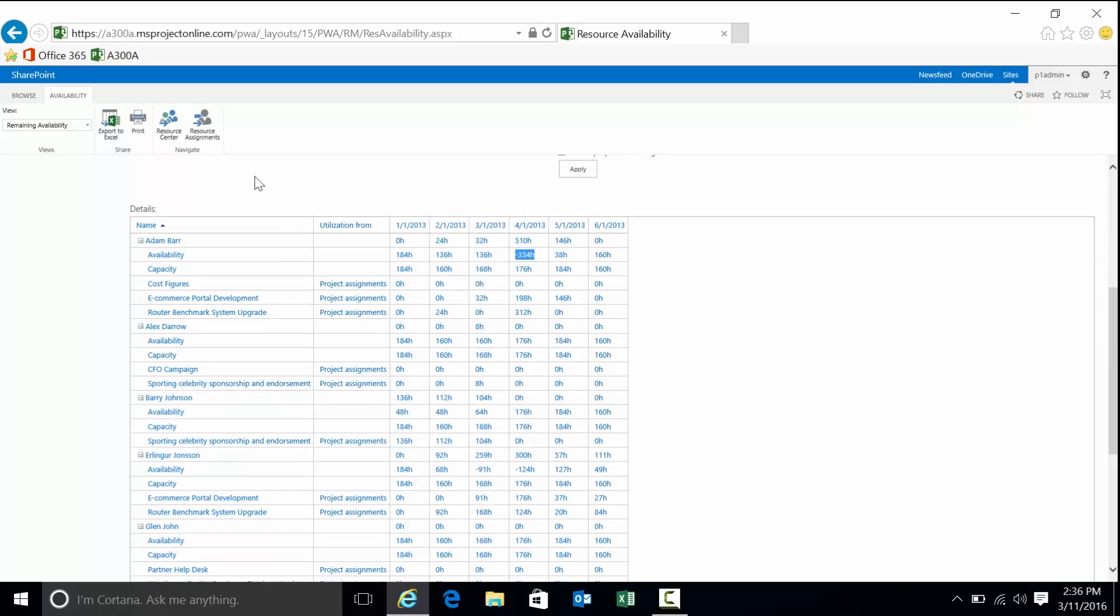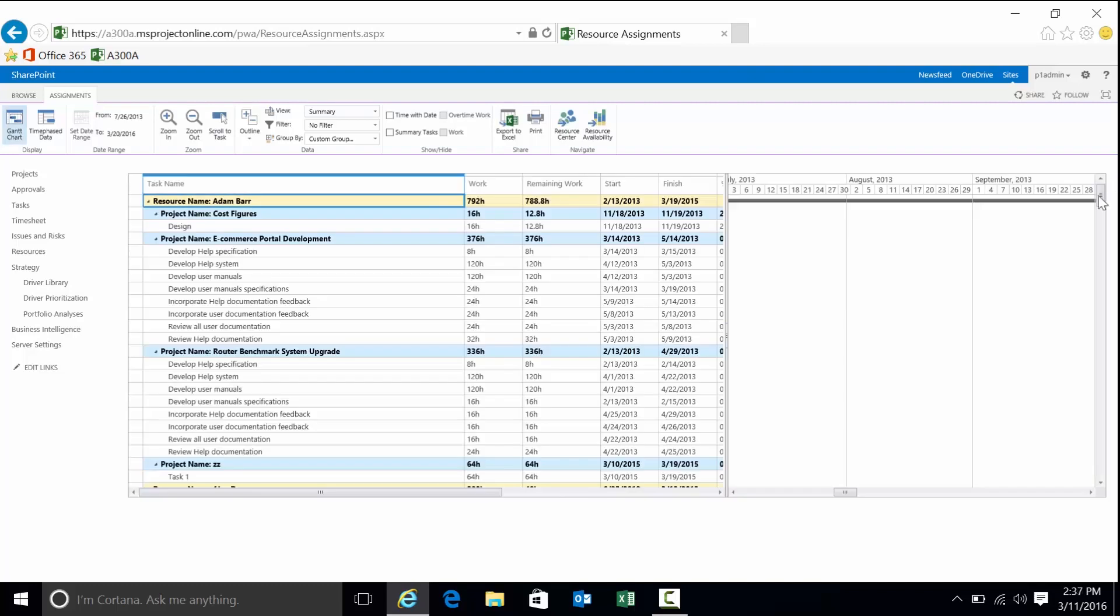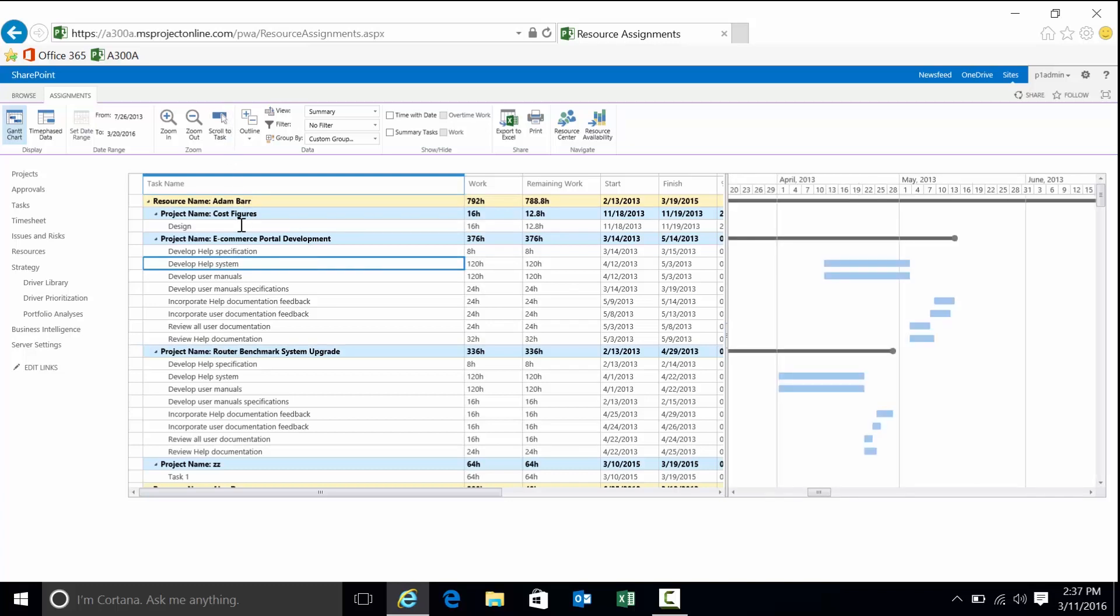If we take the capacity and subtract the scheduled work, we come out with a whopping negative 334 hours. So there's our issue. We have two projects for a combination of just over 500 hours, looks like 510 hours or so. I can take this down another level. I can get right down to the assignments in the project. This is good because I don't have to wonder at this point. I can get right down to the assignments and find out specifically what assignments. If I happen to own both these projects, it's great because I can take care of the issues.